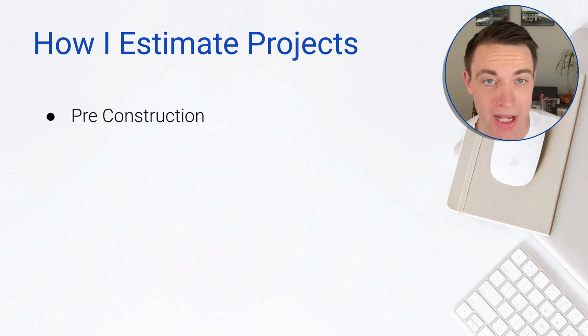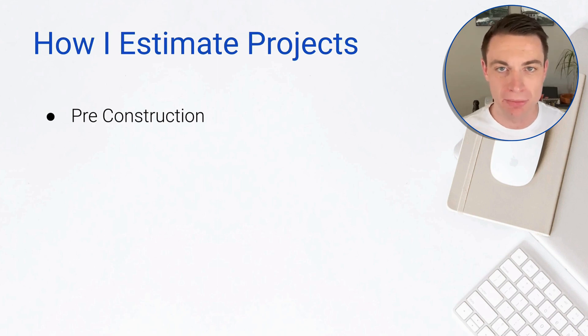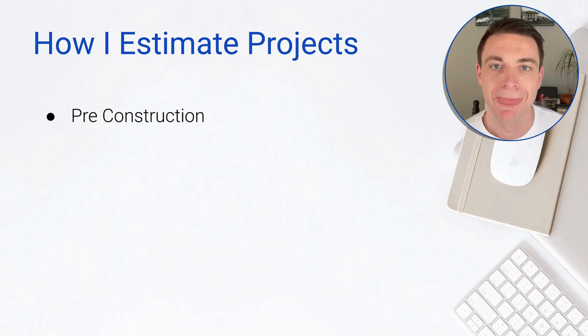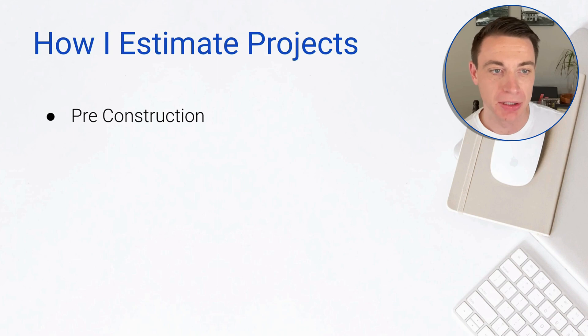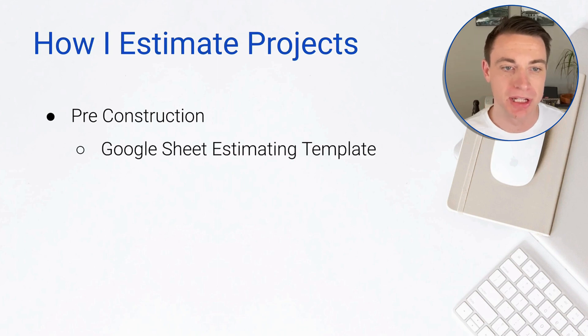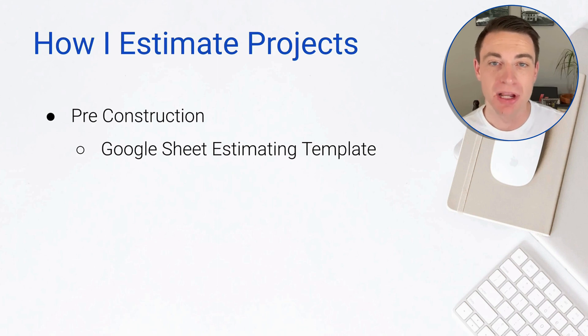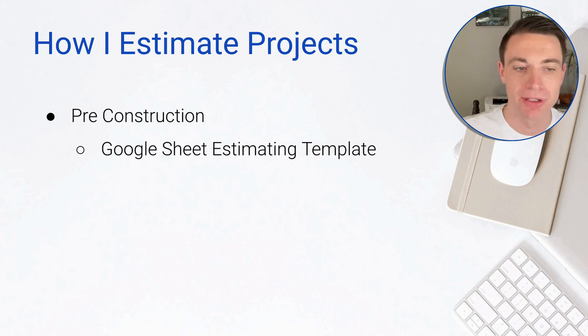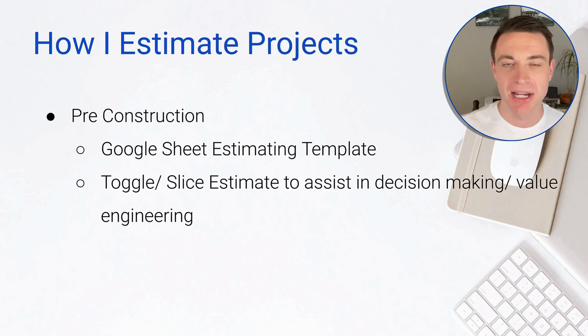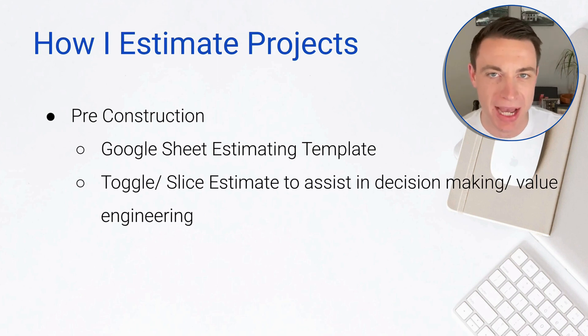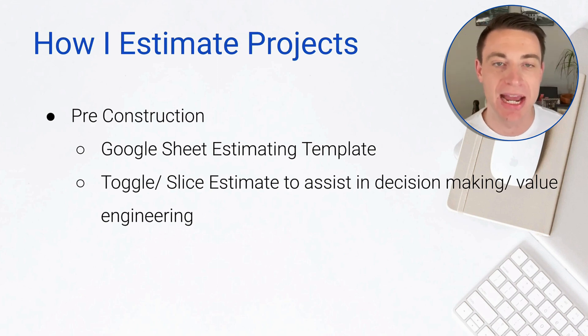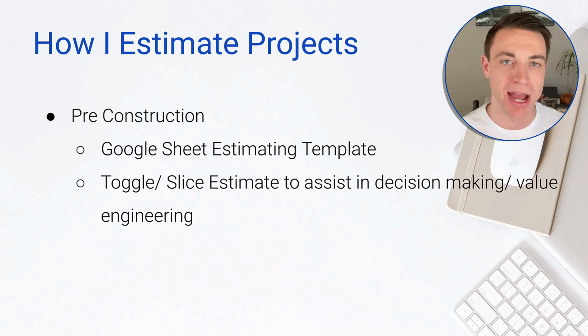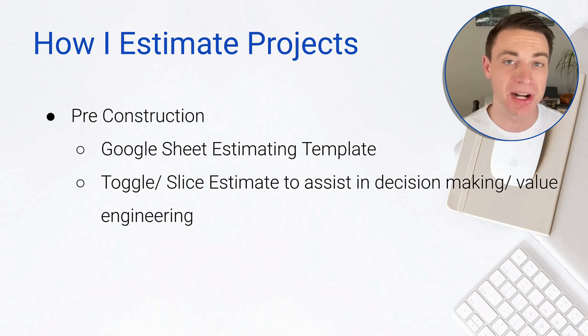Our estimates go through a few different stages as we work through a preliminary estimate all the way through pre-construction. During the pre-construction process, I'm taking an estimate that I've already presented to the customer and I'm tweaking it, editing it, bringing in bids and information as I learn. During this pre-construction process, I use Google Sheets with a template I've created because it gives me flexibility to toggle and slice and dice that estimate as I work with designers, get subcontractor bids, and handle what-if scenarios with the customer. We can add, subtract, and adjust really easily.